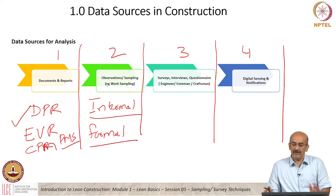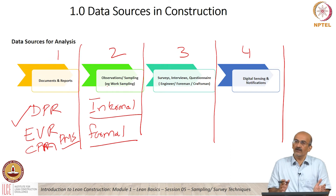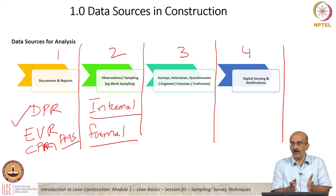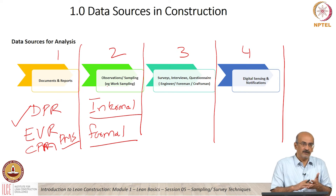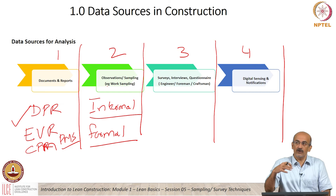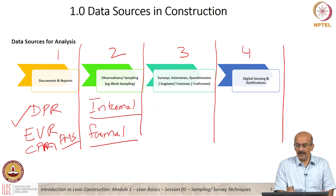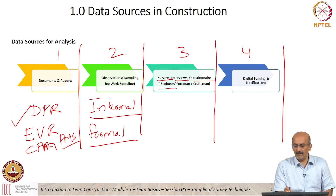Similarly, there are surveys, interviews, or questionnaires that are possible on site to get data. There is something called a foreman delay survey. Instead of going to a documented report or going by observation, I might go on to site, interview the site engineer, the foreman, or the workers, or do a questionnaire survey — which is more formally documented. From all this I get mostly second-hand information on what is happening. I can use surveys, interviews, or questionnaires with any people on the site to get data for analysis.